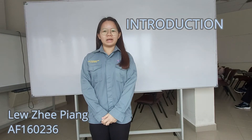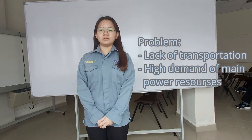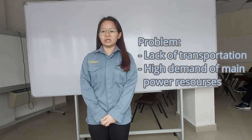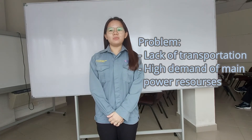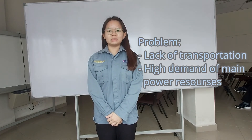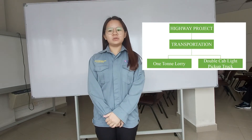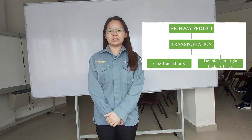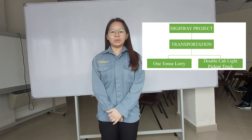In this highway construction project, we are lacking transportation for material resources and labor resources. Construction materials need to be transported from point to point since material suppliers will place them at a fixed location only. The highway project has high demand for manpower resources, such as construction laborers and equipment operators. A large number of workers need transportation to move from place to place. Therefore, our company is currently lacking a one-ton lorry and a double cab light pickup truck for those transportation needs.